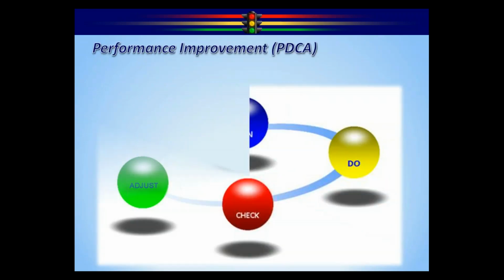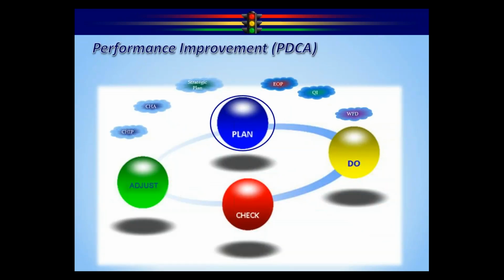Now, we're going to take that plan we just built. We're going to walk it through the PDCA cycle. So P is what we just accomplished. We have a plan in place. Now let's execute the plan. To execute the plan, we have to, number one, create the training content. Then we have to take that training content and go out and do 9 training sessions each month. And then in parallel with that, we're going to go out and start contacting tobacco vendors.